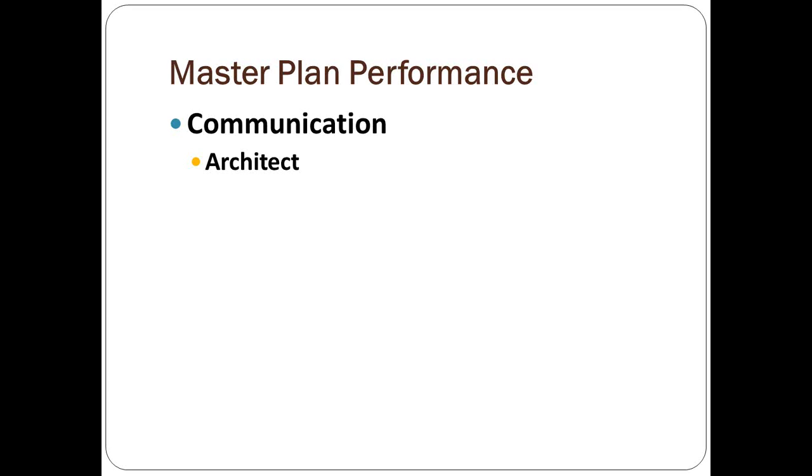You may want to ask them for samples of the work they're doing. If they tell you they're going to charge you X number of dollars for a master plan, and maybe they say schematic design, then say, show me an example of one you've done for other churches so I can see exactly what we're going to get for our money. How long did it take, and what information did you need from us to produce this?